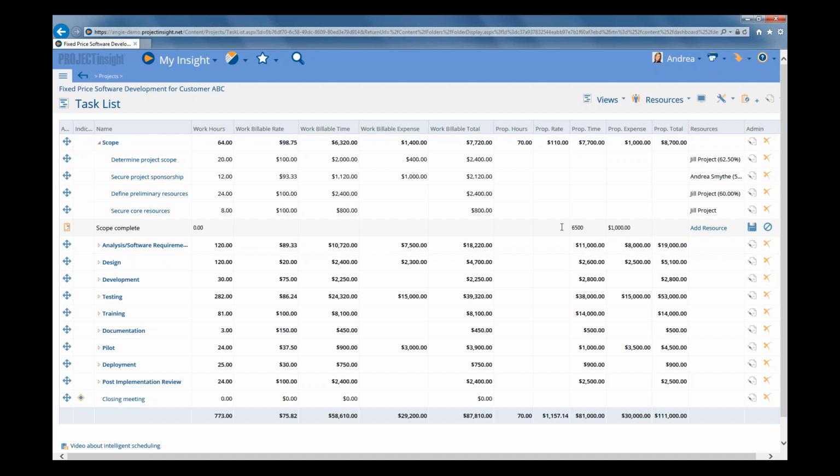Now, this is where you may have some set rules for building in some contingency. So you could say, let's add in a 10% contingency, which is roughly $600. So let's say $600 added onto that, that's $6,920. So instead of $6,920, let's just bump it up. Maybe we make it just an even $7,000 for our labor.